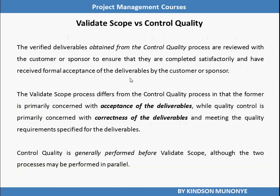There is a clarification I would like to make about Validate Scope and Control Quality. They have some similarity, but take note of the subtle differences between them. The Verified Deliverables obtained from the Control Quality process are reviewed with the customer or sponsor to ensure that they are completely satisfactory and have received formal acceptance. The Validate Scope process differs from the Control Quality process in that, for Validate Scope, we are concerned with acceptance of deliverables, while Control Quality is primarily concerned with correctness of the deliverables and meeting the quality requirements. Control Quality is generally performed before Validate Scope, although the two may be performed in parallel.